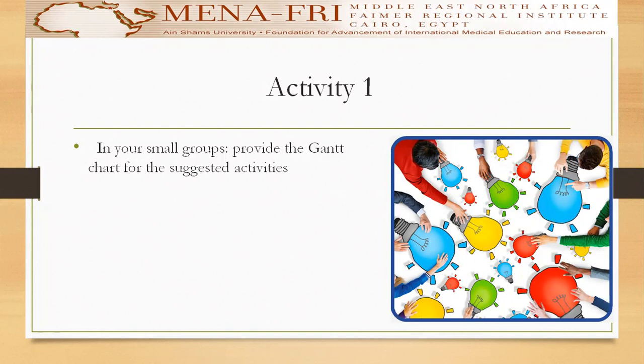So this will put you in a table where the row represents the time and the column represents the tasks. And then you start labeling where you start with the task and where you end with the task. You can color these boxes, or you can just draw a line of shading in them. So at the end of the day, you get a map, a table that has shadings indicating the start of the project and indicating the start of the task and the end of the task.